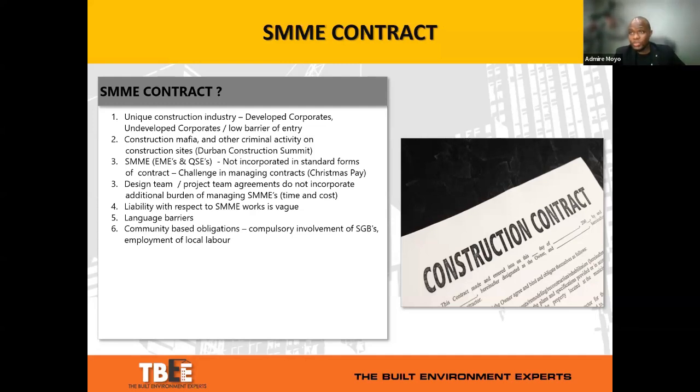When it comes to payment issues, for example, now we're going into December. South Africa has a Christmas payment expectation from our SMMEs. When you're in the shoes of an SMME, you understand why they want to be paid for Christmas. But if you're in the shoes of the design team or the contractor, you don't understand, because the principle is you get paid for work done or work executed. So those are the dynamics that this framework addresses.